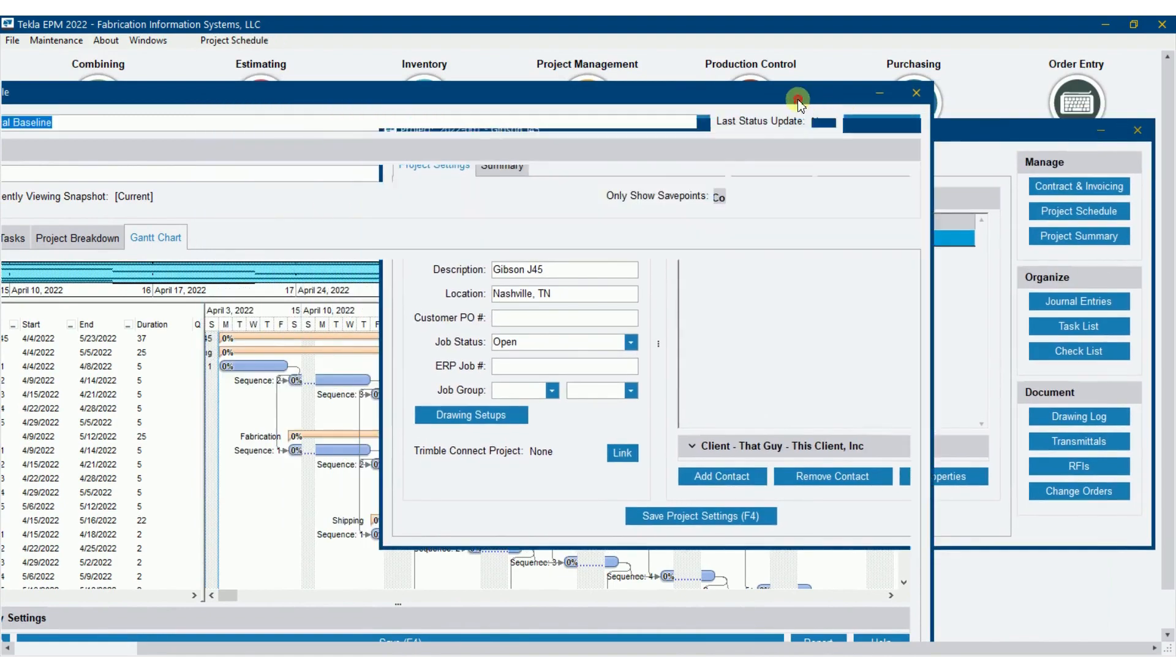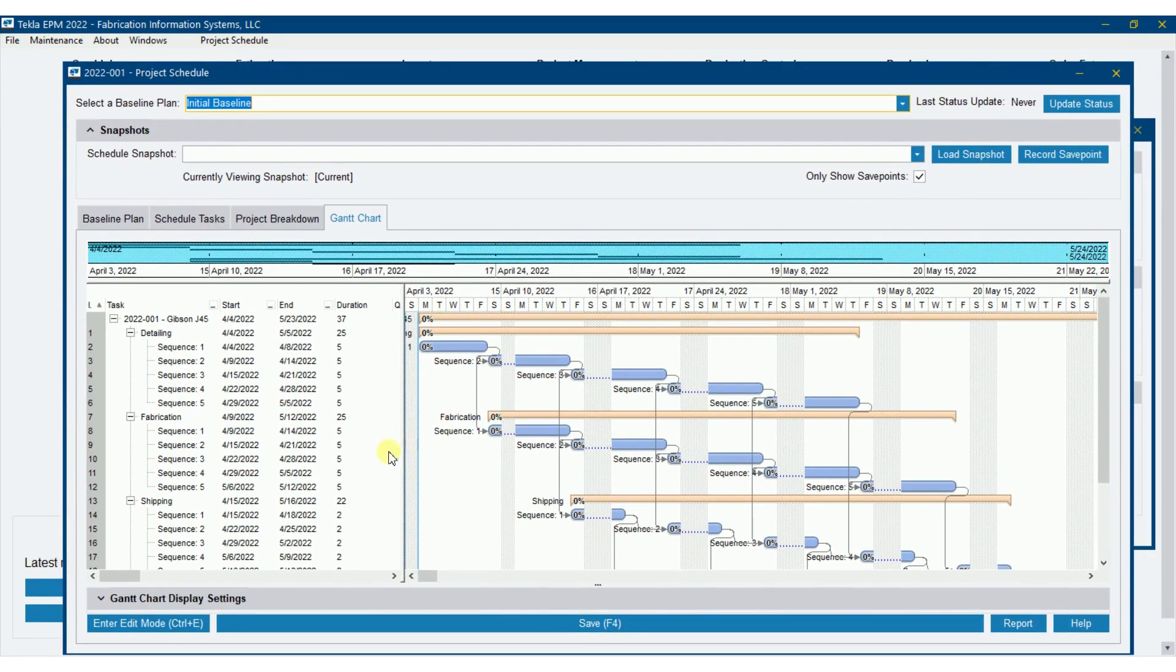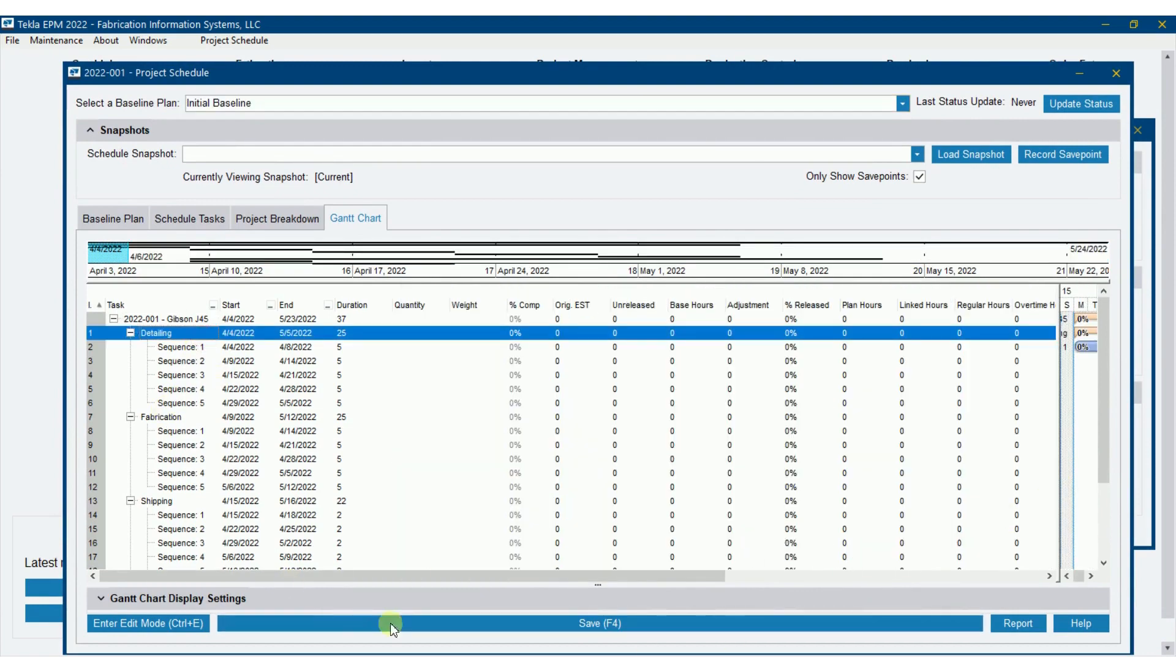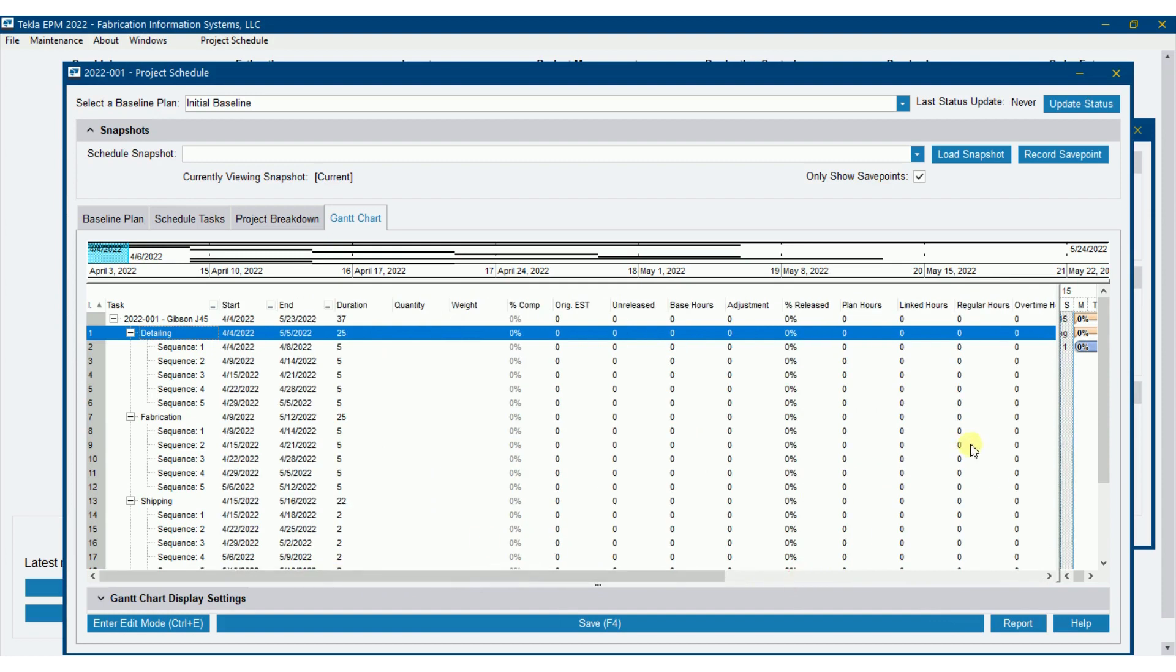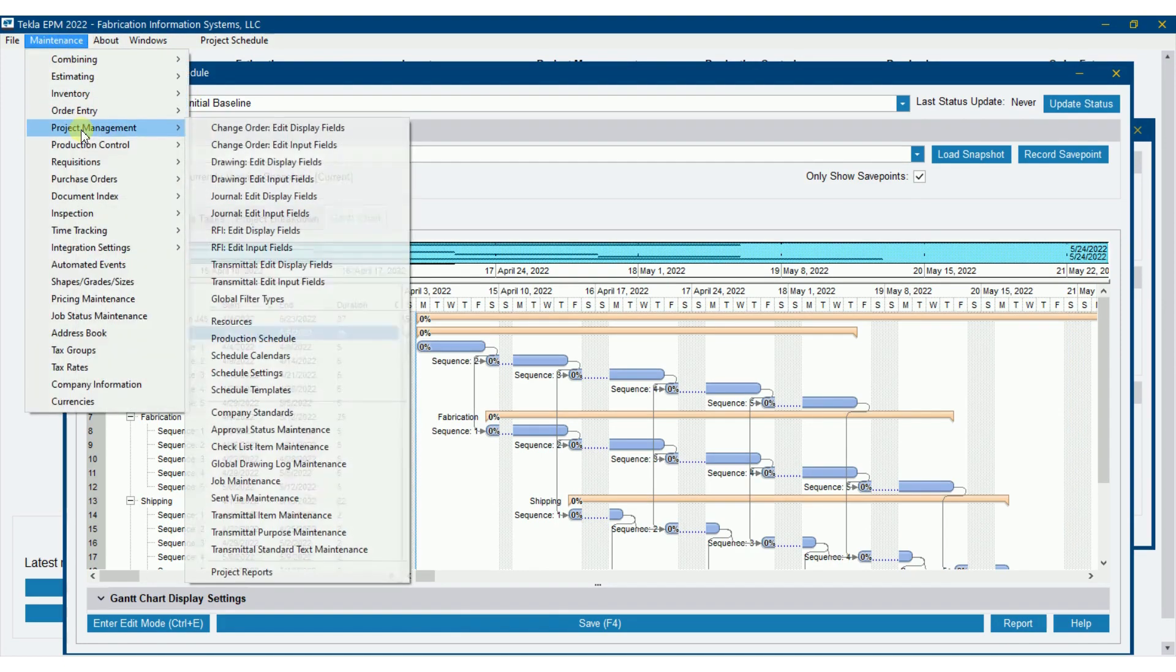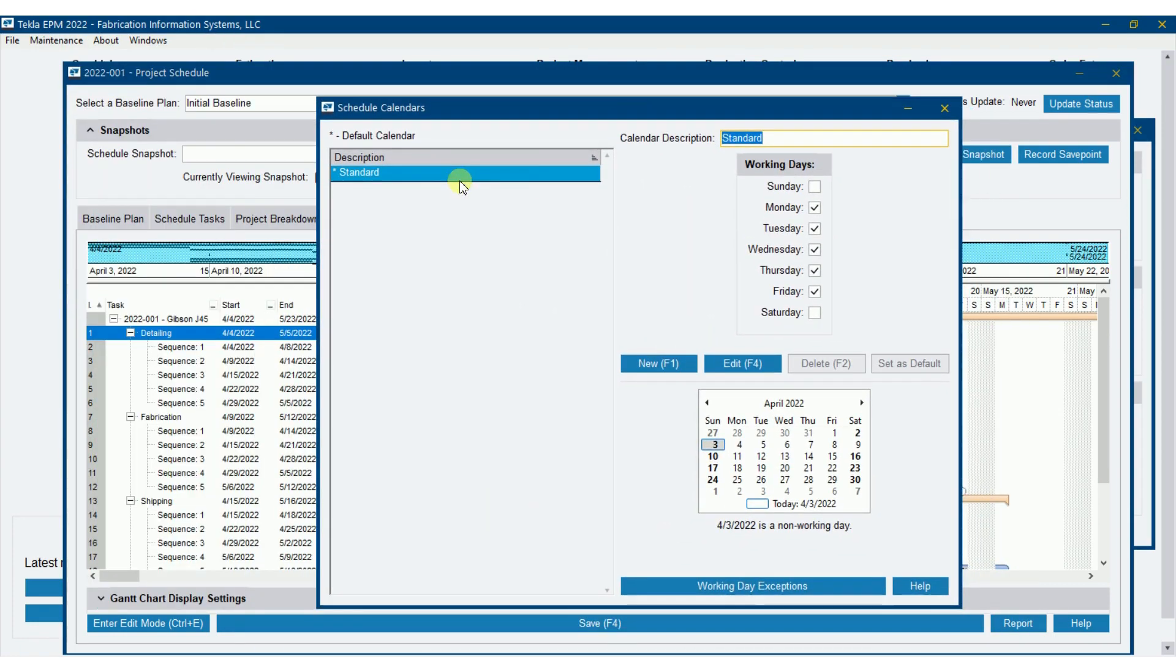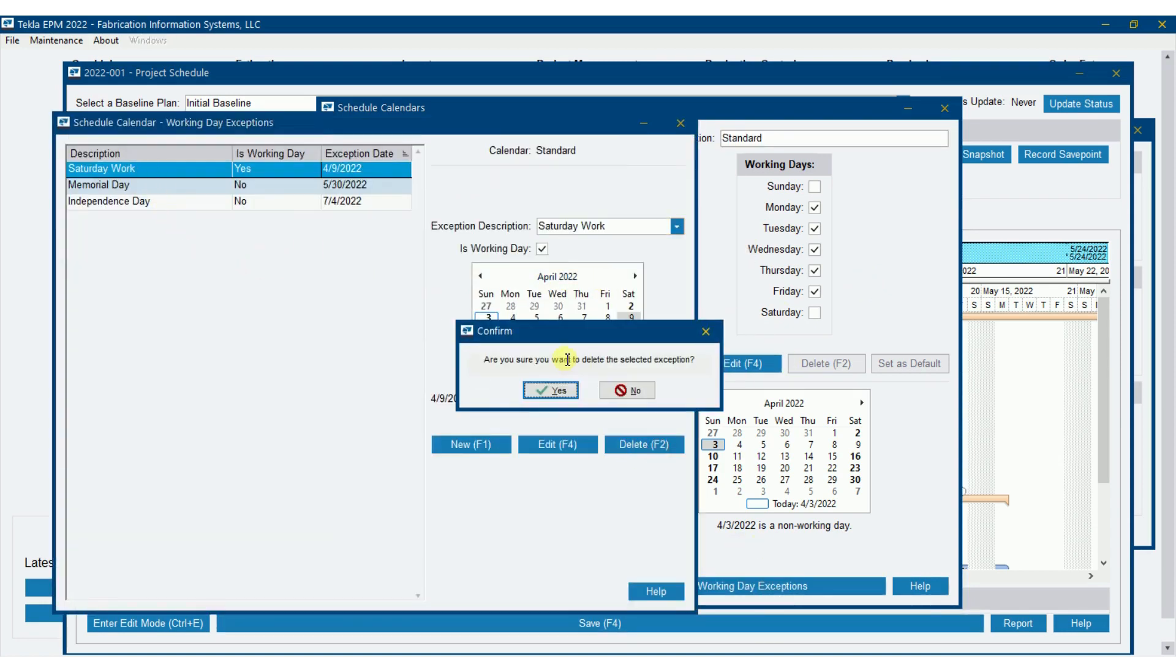This brings up another point though with where you might want to have multiple schedules. So we're assigning resources here. For detailing here, we assigned a resource of detailing. Fabrication, we assigned a resource of fabrication. Might make sense to have detailing with its own calendar so that the shop may be working this Saturday, but detailing isn't. So there's another reason where you might want to have your own calendars set up differently. You might have a detailing calendar, a shop calendar, so on and so forth to apply to each one of the resources individually there. I'm going to take back out this Saturday work, but that could be applied if I needed to further on down.